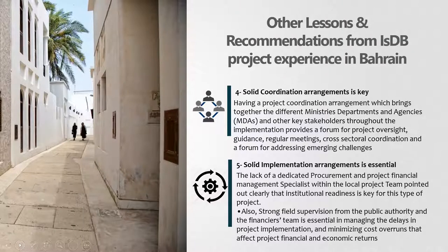The lack of dedicated procurement and project financial management specialists within the local project team pointed out clearly that institutional readiness is key for this type of project. Also, strong field supervision from the public authority or the executing agency and the financial team is essential in managing the delays in project implementation and minimizing cost overruns that affect project financial and economic returns.